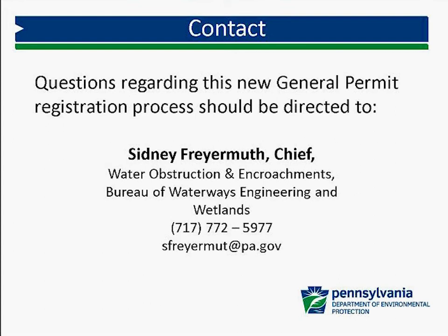That was approval of their general permit, and it is not. Fish and Boat is approving the use of pre-approved fish enhancement structures. I've talked with Fish and Boat, and they are in the process of providing letters of authorization that will need to be submitted with your GP registration if you're utilizing GP1.